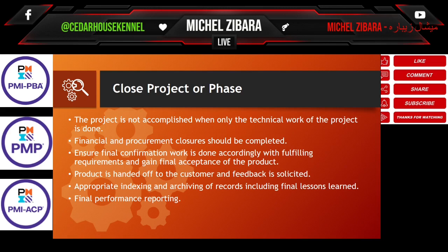I would like to add, and there is a lot more to add to the closure process group of the PMP, that we should be mindful not to forget there is a benefit realization plan, and the project manager should keep an eye, once he delivers his working product to the operations team, that there are no defects and no problems throughout the operations, and make sure that the users operating that working solution are maximizing its utilization and generating the maximum value to the organization. That's very important as part of the closure.